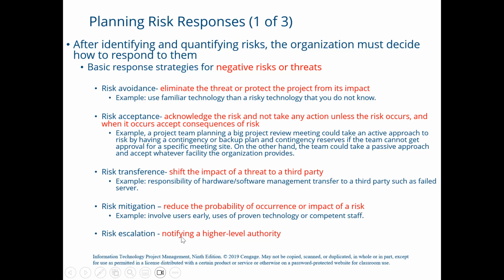So, if the risk is outside of the scope of the project, or the proposed response is outside of the project manager's authority, it would make sense to escalate, to notify and inform a higher level manager within the organization of the risk.